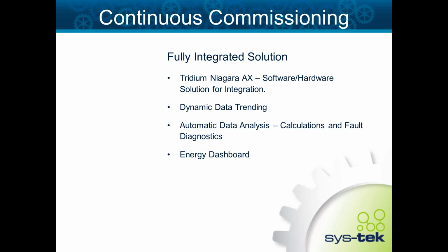This is commonly utilized for LEED measurement and verification, and then also we utilize it in retro commissioning, where we'll launch one of these kits at a building, pull in the building automation system information, and then start analyzing and trending that information a few months or a few weeks before we even start our retro commissioning activities, in an effort to learn as much about the systems that are being retro commissioned as possible, and then also fine-tune what we are going to accomplish and focus on during the retro commissioning process.